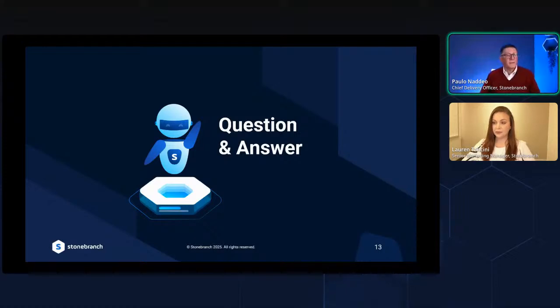We need to have a team prepared to take on these changes and start to implement them in UAC before the cutover. Of course, we need to understand this very early on in the project, because we need to plan for it, right? So if this is going to be a problem and there are a lot of changes, it's probably good advice to have more waves in the process so that the changes are not that massive.